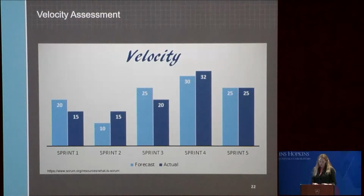It shows the total number of tasks planned and completed for each sprint. And this type of chart can be used to revise the forecasted delivery for the project. It can also be used by the Scrum team to understand their sprint planning, team strengths, and weaknesses to improve future sprint deliveries. If you've assigned a cost to a story point, this chart can then be used to show